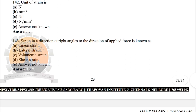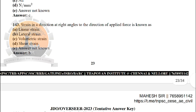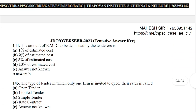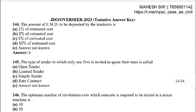Next: strain in the direction at right angles to the direction of applying force is known as — the correct answer is option B: lateral strain. Next: the amount of EMD (Earnest Money Deposit) to be deposited by tenderers — the correct answer is option B: two percentage of estimated cost.